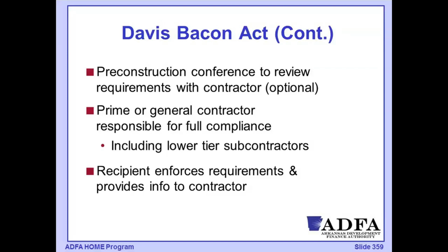As part of this, those wage reports will be reviewed and compared to the applicable rates, but there also will be on-site interviews conducted by either the recipient or by ADFA staff in determining compliance.